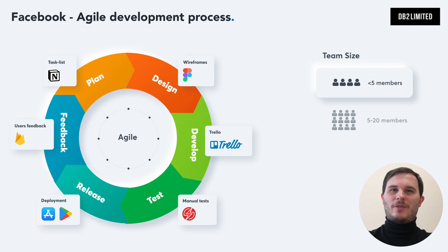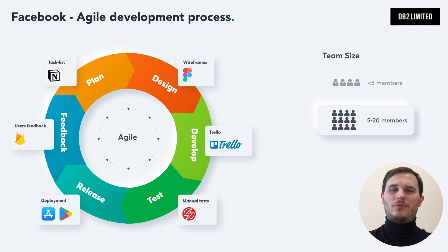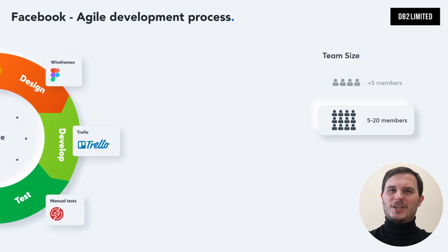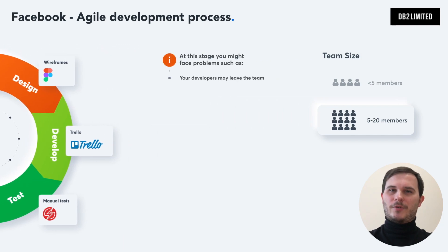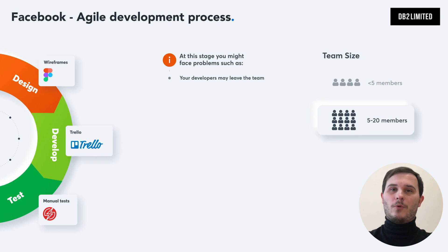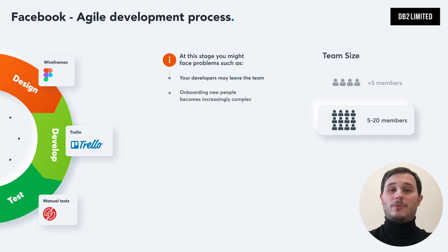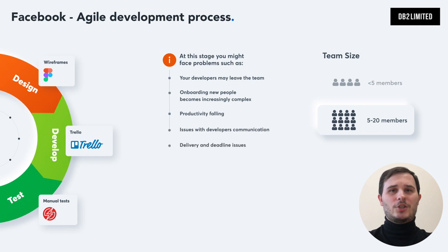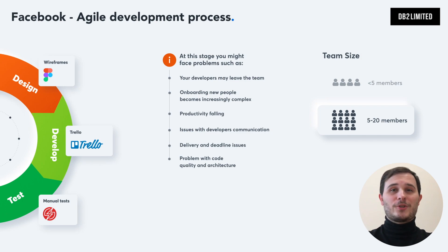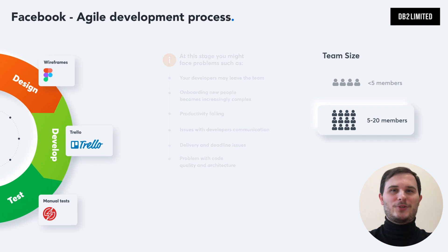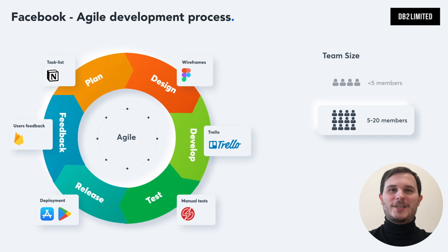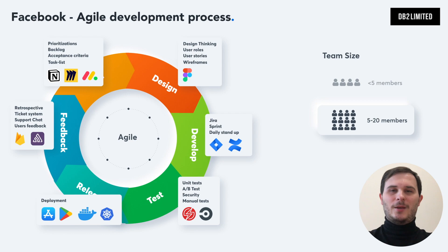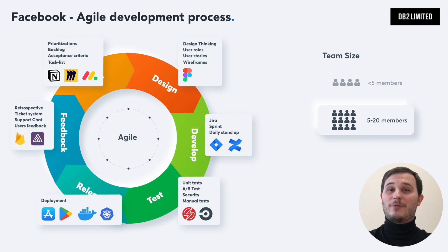But imagine that your company is growing and you have a team of 15 developers. At this stage you might face problems such as your developers may leave the team, onboarding new people becomes increasingly complex, productivity failing, issues with developers communication, delivery and deadline issues, problems with code quality and architecture. In order to solve these issues you have to assign a tech lead to oversee the team, hire a project manager to oversee the project, implement scrum, sprints, backlog, retrospective, organize daily stand-ups, use advanced task management tools like Jira.